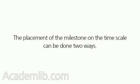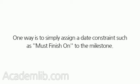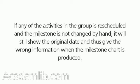There is one risk in creating these milestone charts. The placement of the milestone on the time scale can be done two ways. One way is to simply assign a date constraint such as 'must finish on' to the milestone. If any of the activities in the group is rescheduled and the milestone is not changed by hand, it will still show the original date and thus give the wrong information when the milestone chart is produced.